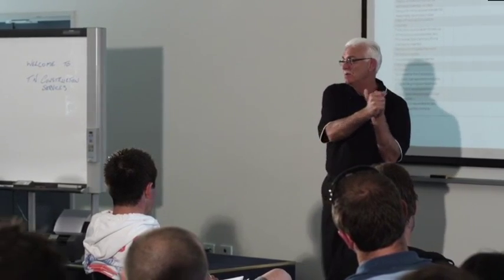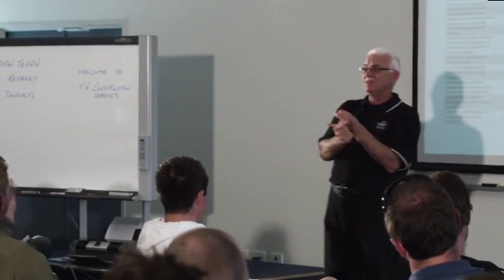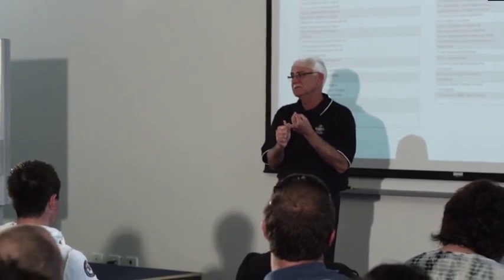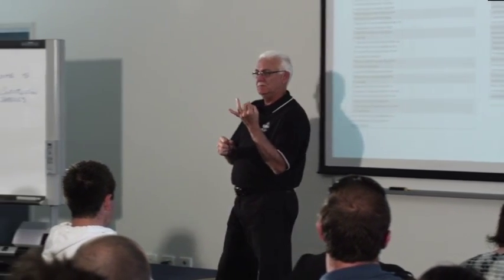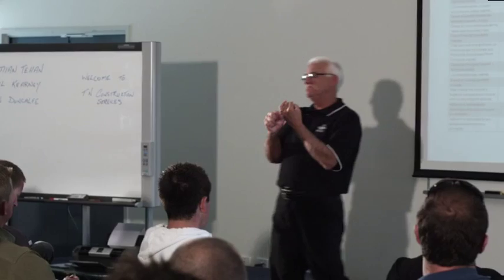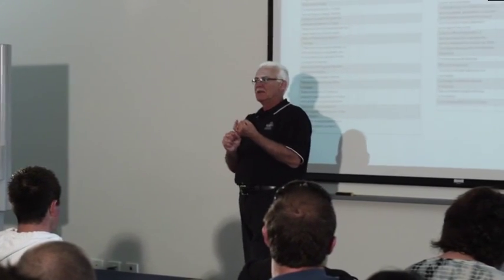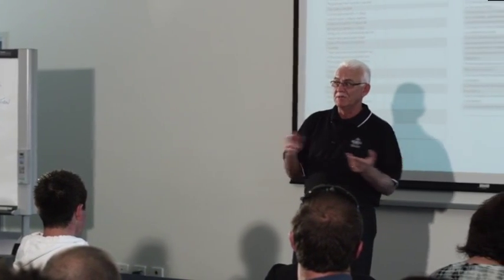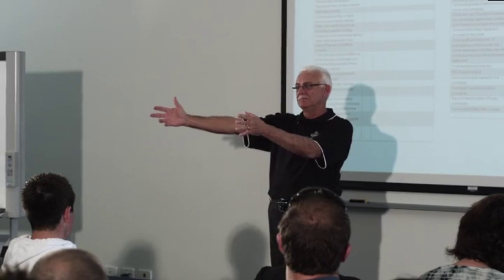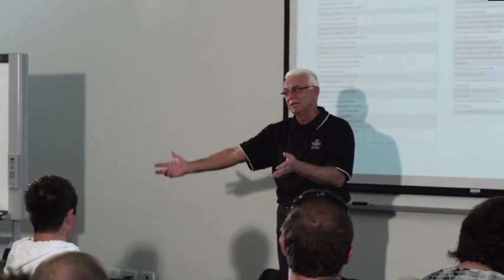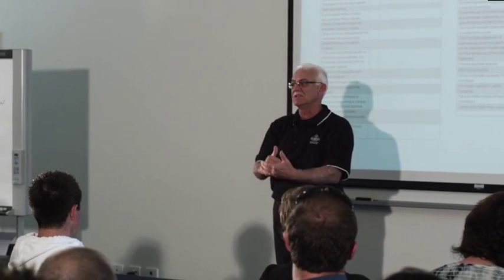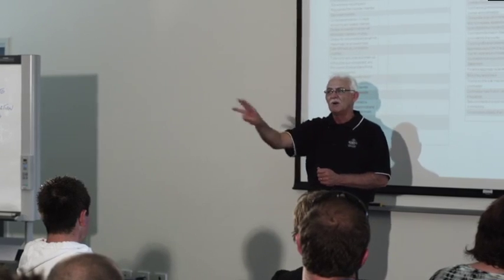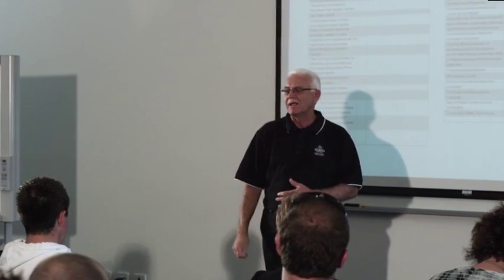Your overhead costs at the moment might average, depending on the size, an average size builder would be around 13%, maybe more. And then you put your profit on top of that. So your profit might be 7%. So where you guys are saying labour and material and profit of 10%, you're losing. It should be labour and material, 20% on top, and then you're covering all your overheads and making a living, and then you put your GST on top of that, final figure. That's what you give to the owner, 3 figures. Do not break it down, otherwise I'll come back and have a crack at you about it.